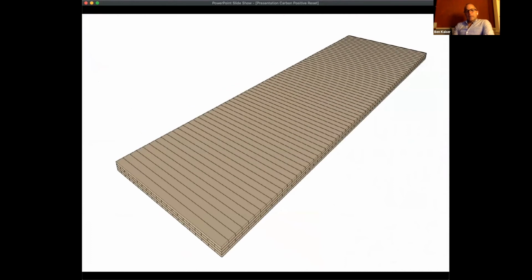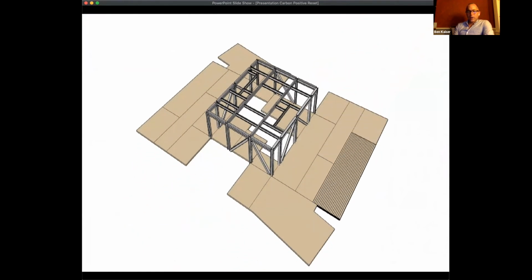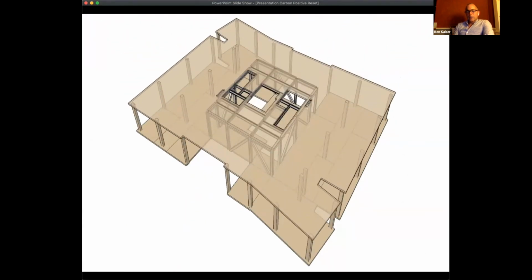And as Julian mentioned, along with the carbon sequestering aspects of these buildings, I think the most amazing thing, and what's going to transform architecture around the world, is why it's different than concrete and steel: the design process is longer in the beginning, but once you push order on the flat pack skyscraper idea, you have a building that's completely ready to erect. This is an all wood building that we never used a saw or a drill on because of all the work done up front. Now you're just clicking these buildings together like an erector set, as Julian said, which is impossible in the world of steel and concrete because of the formwork and the expansion and contraction of steel and all the other trades involved, whereas with wood, just a few people can erect a skyscraper.